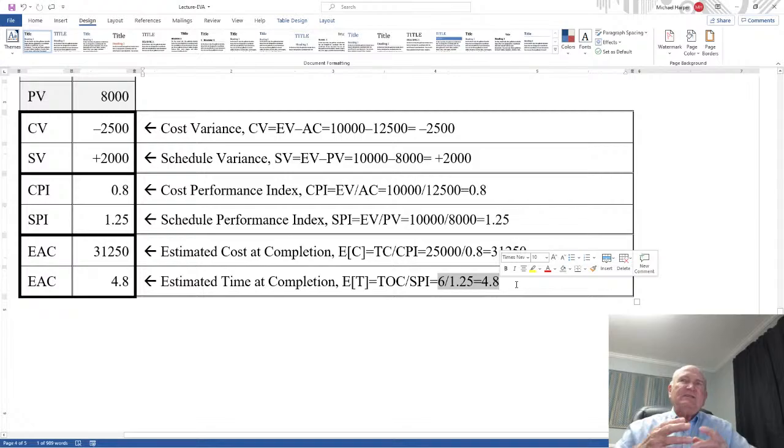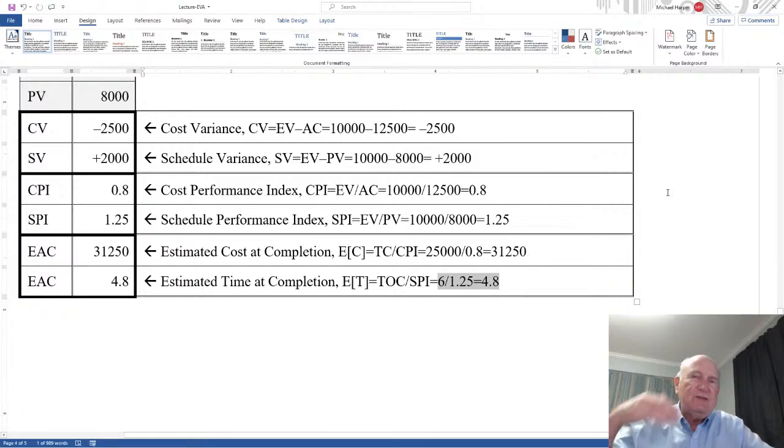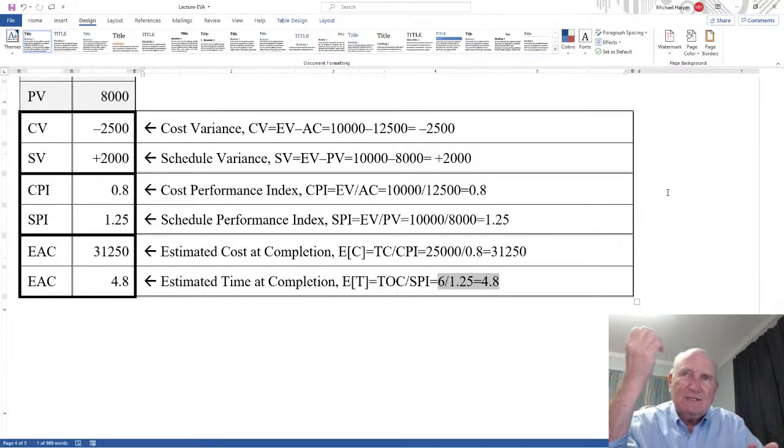So if you give us $6,250 more dollars, then we'll get this done in 1.2 months. So $6,250 will buy you 1.2 months. Do you want to do that? Yes or no? If no, we'll go back to the 6 month $25,000. If yes, then you give us $6,250 at the end of the project, and we'll get it done in 1.2 months. So the hospital said, "Oh, okay, well, let's see here.